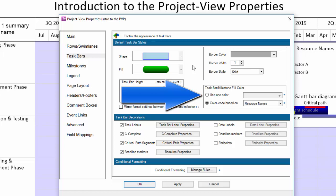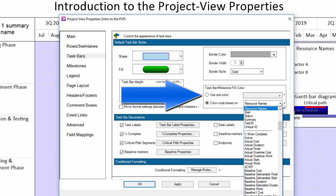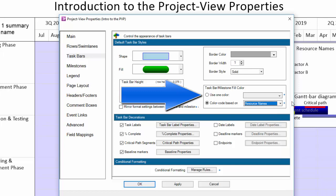This setting here is duplicative between the task bars and milestones tabs and will color your shapes differently based on values in a field from your source file. However, be aware this is not where you can tell OnePager to give certain values certain colors. For example, maybe you want a status value of late to always be colored red. This setting will only make sure that each unique value is colored differently, but you don't have control of what those colors are.